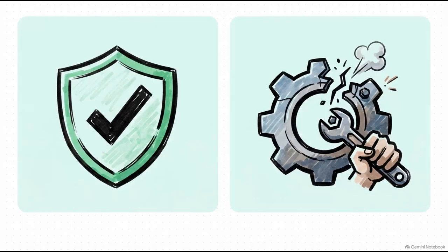When calculating the cost of quality, you're always weighing 2 distinct things. Conformance represents the proactive costs of preventing poor quality. Think of things like training, buying high-quality materials, and the time spent just doing it right the first time. You are comparing that against the cost of nonconformance, which are the incredibly painful, reactive costs of failures. We're talking internal rework, scrapped materials, warranty liabilities, and lost business.